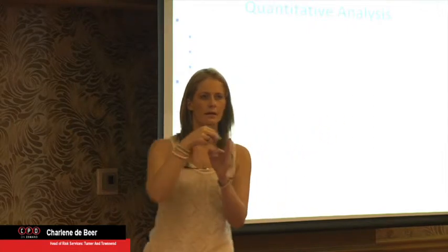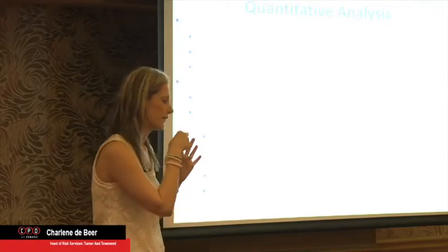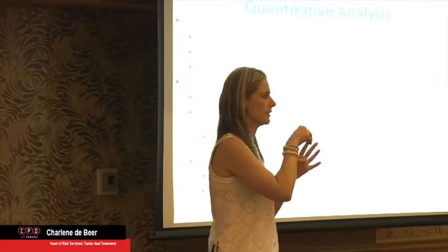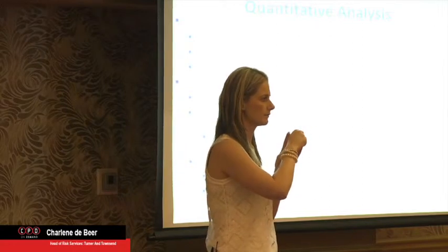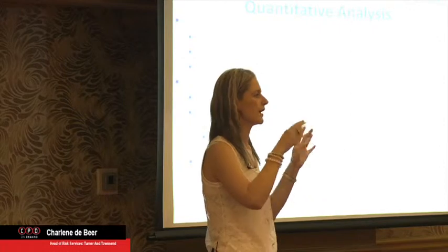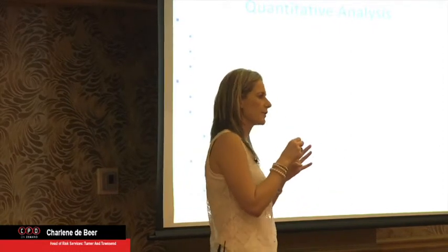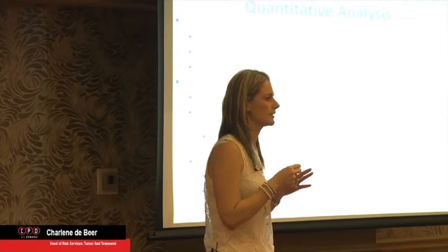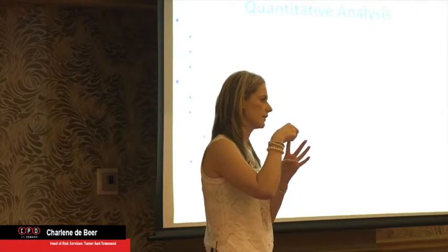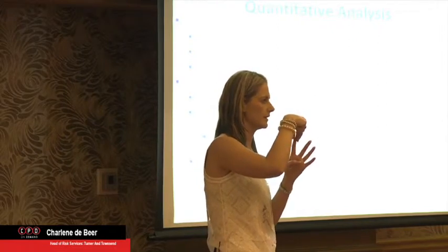And then this is where guessing usually comes in: what percentage of civils will be affected with this risk? So if it's rain or a civil strike, it will be 100%, the whole site, nobody will work type of thing. But let's say it's just one of the buildings and we can proportion it to 5% of the civils bill of quantities, it's 5% of what they need to do, then 5% will be delayed.